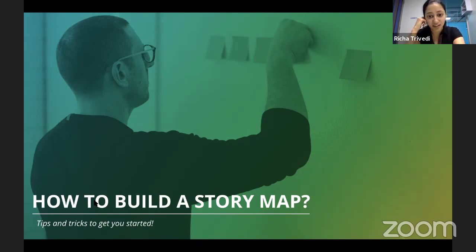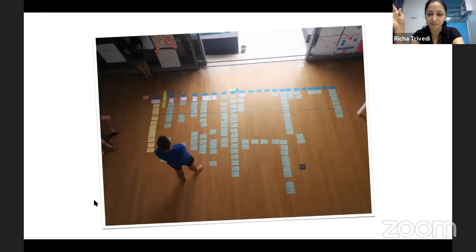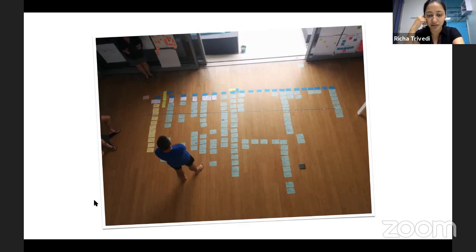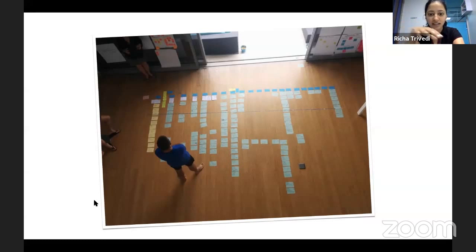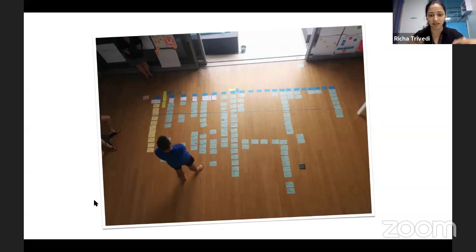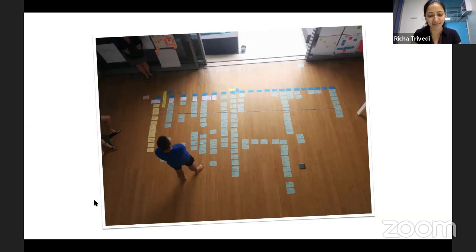So the first and foremost thing is this is how it looks in the end. This is like a finished story map from one of the projects. So the key idea is to first clear up the space. It could be wall, it could be like a floor space, anywhere where you can spread the cards and the limitation should not be space.